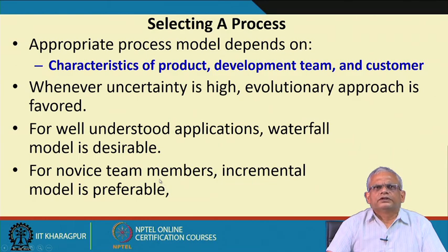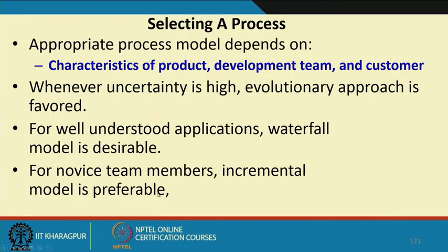But if the team members are novice, they do not have much experience on the projects and even similar types of projects, then typically an incremental model is preferable, where some small increments are planned and completed, and that way the project builds up. With this, we will be completing this lecture, and then we will take up estimation of the project and then scheduling of the project.